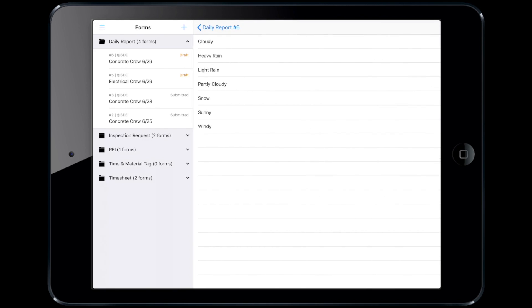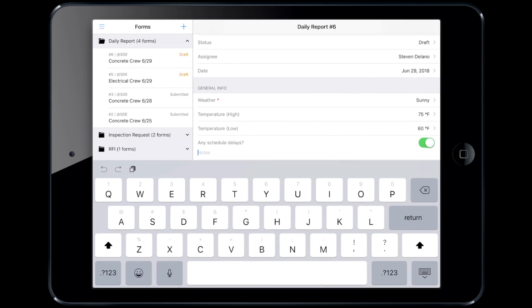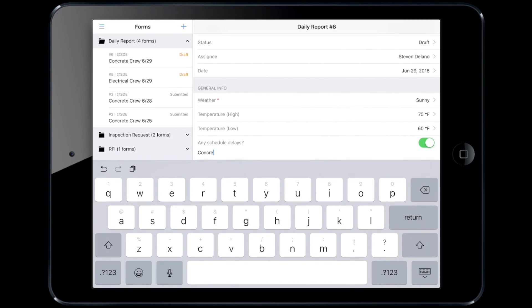Weather is a mandatory field for any Daily Report. Steven now has the following four optional fields: Schedule Delays, Weather Impact, Accidents on Site, and Injuries Reported. The concrete truck was two hours late, so Steven checks the box for schedule delays and notes that the truck was two hours late.